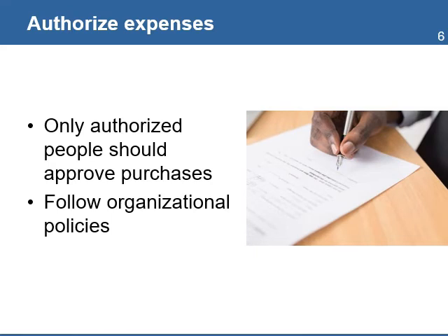As a project manager, the organization will give you authority to approve expenses. Sometimes the organization will have a limit, for example, $10,000. Above that limit will be a supervisor or another executive who will approve the expense. You must follow the organization policies that determine who can authorize expenses on behalf of the project and what the limits of the authorizations are. Make sure that you're aware of all the people that have authorization to charge expenses to the project budget.